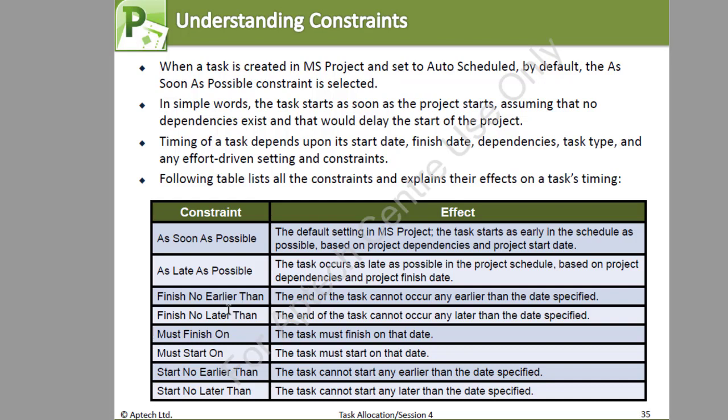Must start on, that is serving of food must start either immediately after the prayers that was given there or whichever other event that you want. Start no earlier than means that you can't start something earlier than a given time. For example, the serving of refreshment can start no earlier than when the first guest arrives.